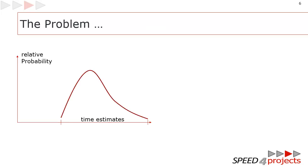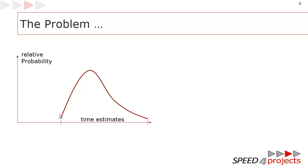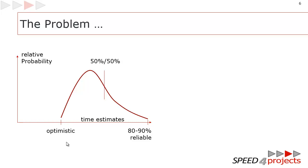If it comes to buffers, you always have the problem that no one really wants to tell about the buffers they have in their work packages. That's a psychological problem because we are trained to deliver reliably, so we add buffer into our work package estimations. On the x-axis is the estimate, very often done in days. On the y-axis you see the relative probability, how probable a value is.